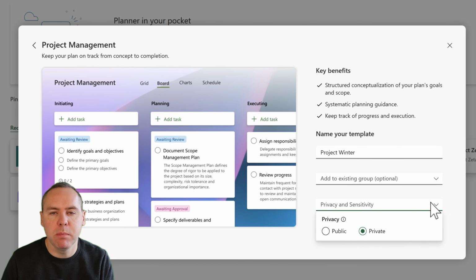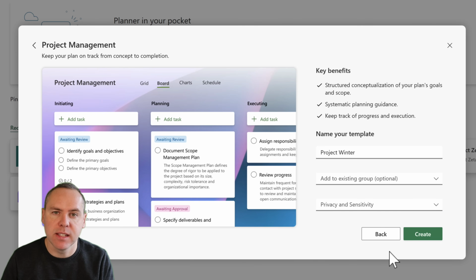So here, it's really important to define our security. Is your plan going to be available company-wide without any restrictions in access? Or equally, should it be private and only visible to named people that you and your team bring in to be able to share tasks inside of your plan? And the majority of plans that we see working with customers, they will select a private plan. So here I'm going to leave it as private, ensuring that only named persons have access to tasks moving forward, and that visibility is certainly restricted and it won't be available across the whole organization.